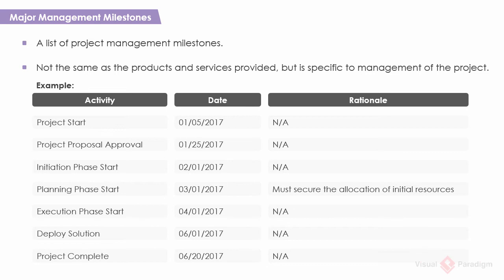A set of preliminary estimated milestones are developed during the project proposal. You can revise the list by editing the estimated date and adding more items. For each milestone, state the date it will happen, and the rationale of your choice, which is the supporting reason for the date being what it is. For example, the dependencies on other projects, funding, and other requirements.